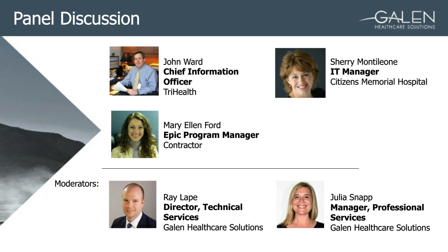And so there's a lot of risk in trying to find people outside of your knowledge base within your organization initially, but finding the right people on a contractor basis is imperative, because these folks have done it before. You want to find people who've already worked on Epic conversion projects, who understand that destination system as well as that core data that they're pulling. So vetting that out early is really important.